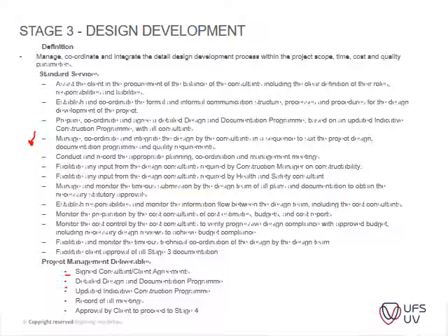Update the indicative program, okay, the construction program. So now you start conceptualizing your program a little bit. Now you incorporate, for instance, that the civil work should take place first. So you would divide your program into the large items that have to take place, like for instance your civil works, water reticulation before you actually break ground for your buildings, etc., etc.